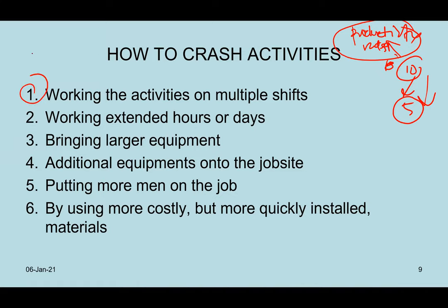Okay, first thing first, working activity on multiple shifts. Meaning to say, now you have to have the mentality as in the manufacturing sector. In a factory, they normally have three shifts, 1, 2, 3. They are working for 24 hours. Can you do that in construction? Well, some projects are forced to do that, especially in urban areas, Kuala Lumpur and so on,